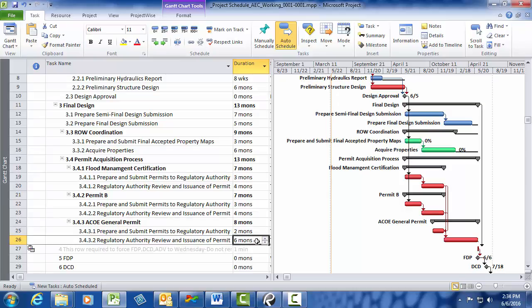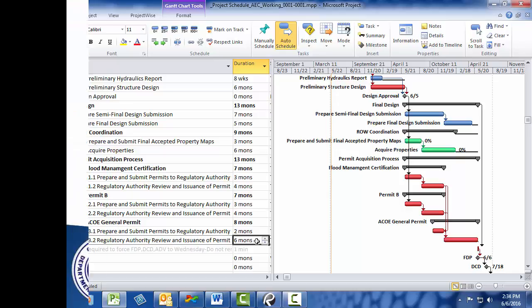Now I should state that there are always unforeseen problems on every project, but doing your best to collect this information during the project initiation phase will help estimate more accurate milestone dates. Next, it would be good practice to coordinate with the Office of Rights-of-Way, Utilities, and other support units to fine-tune the schedule as much as possible. Once this is all done, I'm ready to submit my preliminary schedule via the RPM.